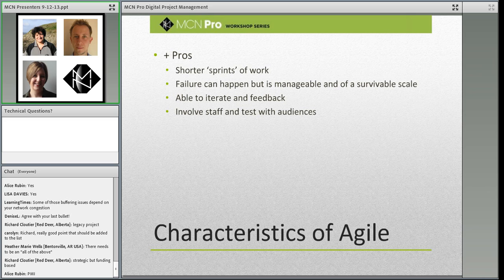So let's think about waterfall. Now, I think if you find agile potentially a bit chaotic, then you're going to love waterfall. So this is dead straightforward. The main thing about waterfall is it's a sequential approach. So phase 1 is followed by phase 2, is followed by phase 3. So very straightforward. And those building blocks, the key thing about them is that any one of the new phases is completely reliant on the successful completion of the one before. Again, you don't get out of doing the paperwork, you're still going to need to do that. But it gives you a sense of how that's going to work.